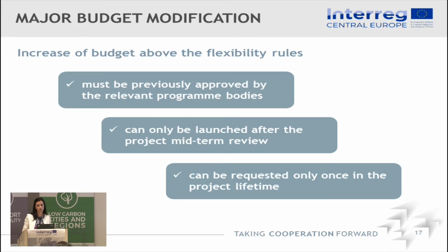So you should really carefully plan when you request such a modification, because afterwards you cannot do a major modification again. You can then again do minor budget modifications after the revision of the application form through a major budget modification, but no second major budget modification is possible.